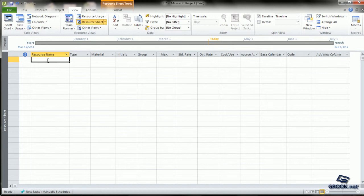The cost resource will be probably if the painter charges some amount for travelling to your location. That becomes a cost resource. That has no work done. Whether he takes one hour or whether he takes two hours to reach the place, it is immaterial. But you are paying a travelling cost. So such resources get classified as cost resources.